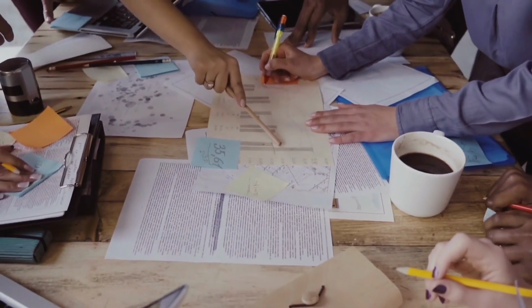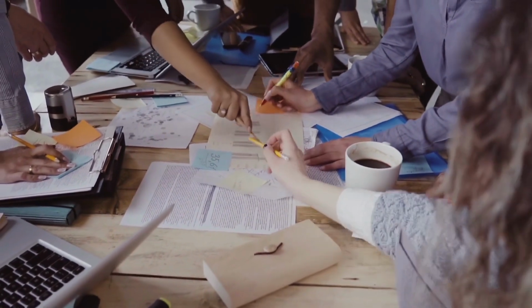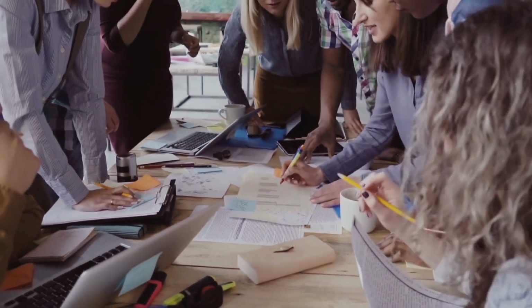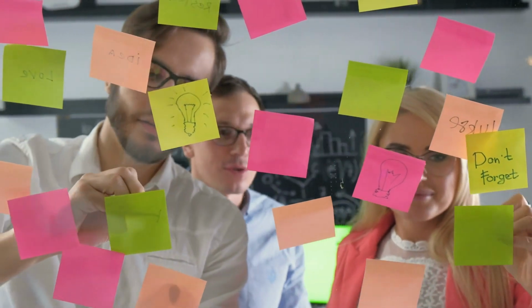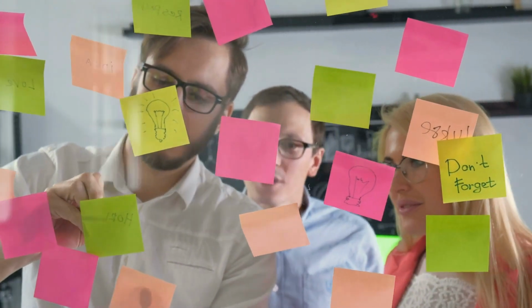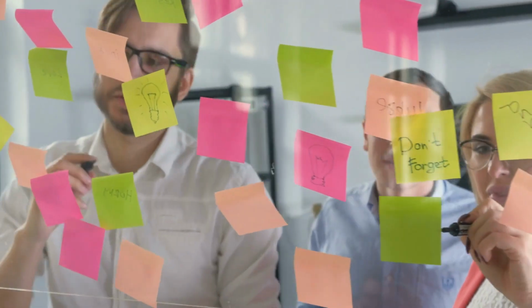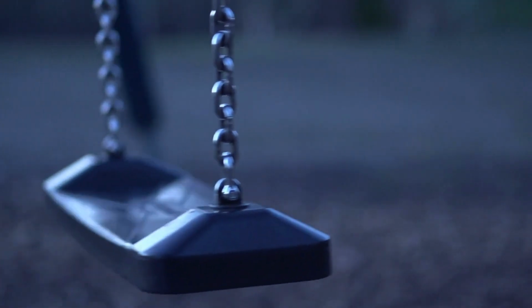As each individual answers these questions, your team might be collaborating to develop this plan through additional discussion, but the 3 question format itself isn't naturally creating this plan. For example, let's say Fred is unexpectedly out for a few days. Ron, Harry, Hermione, and George should discuss anything Fred has in progress and determine if they can or should push the work forward or if it makes more sense to wait until Fred returns. However, if the team is overly reliant on the questions, this discussion never happens.